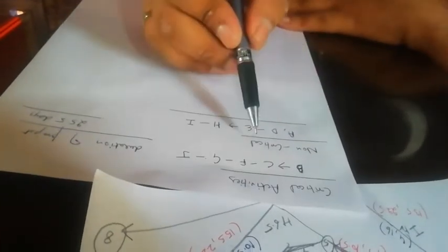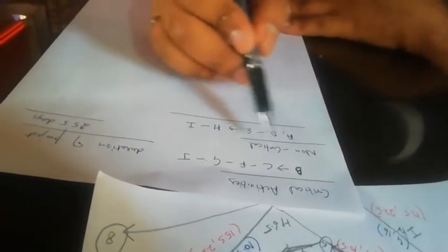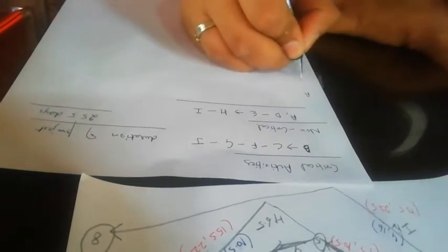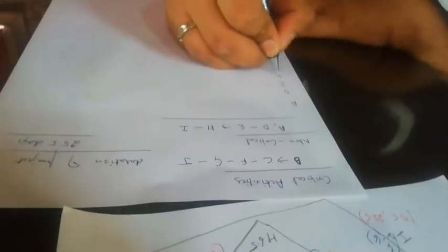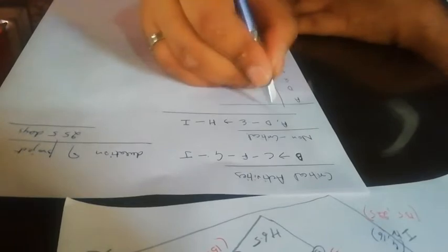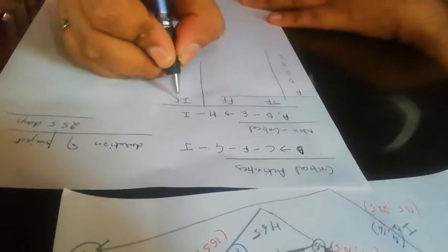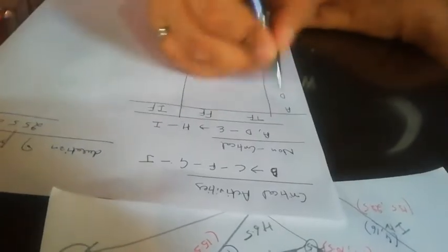So now we can calculate the delay and the floats possible in this, and floats are only possible in non-critical. So we calculate the float for the non-critical: A, D, E, H, I. So there will be total float, free float and independent float to these non-critical activities.